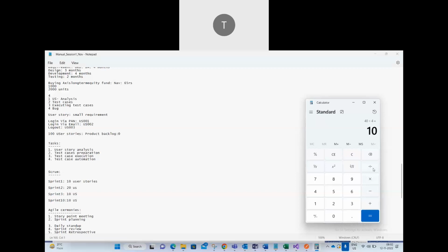Like that, we know the forecast of the project, based on how much we are delivering in each sprint. The project manager or scrum master will plan the project like this. That is the duration: if every sprint is going fine, the project should end in 10 months.